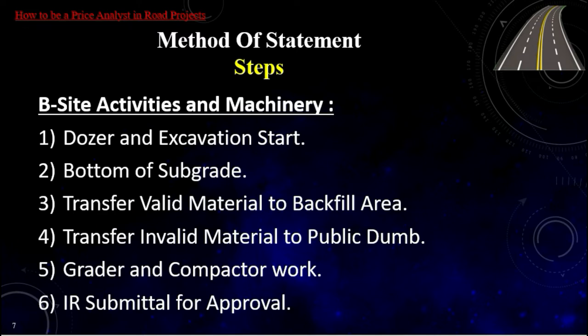The materials engineer from time to time follows up on the excavation product validity. The instructions must be clear and strict for the dozer operator to separate the valid materials away from the invalid ones. Since nobody can predict the percentage of valid to invalid material, the pricing engineer has to assume 50% for each, to be one of the obligatory risks of this type of item.